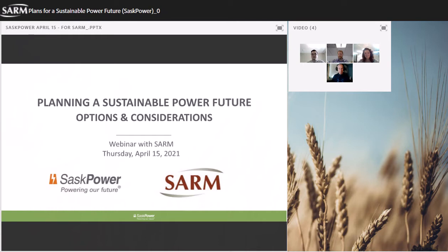Ontario is also evaluating the same shortlist, and they're the ones that are implementing that first mover project that we're looking to de-risk the technology. The construction price, the construction schedule, the operating requirements of this technology is all going to be de-risked through that first mover project in Ontario, and then we might follow in Saskatchewan.